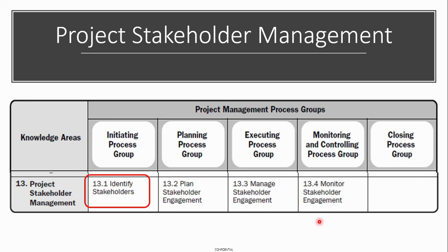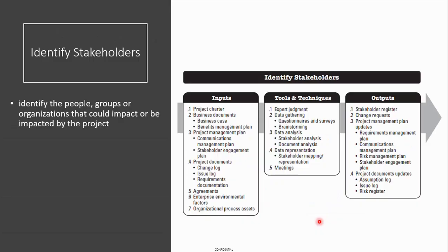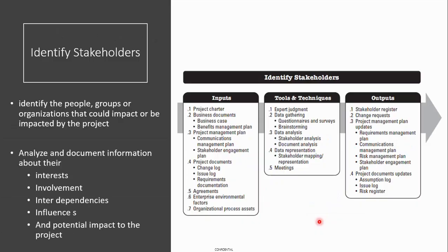Then actually each and every part of your project management will start identifying stakeholders, maybe the requirement traceability matrix: who and who gave the requirement. So this quality requirement was given by the factory manager. So the factory manager is an important stakeholder for you, right? So likewise there will be n number of places where you as a project manager can start gathering information for identifying stakeholders.